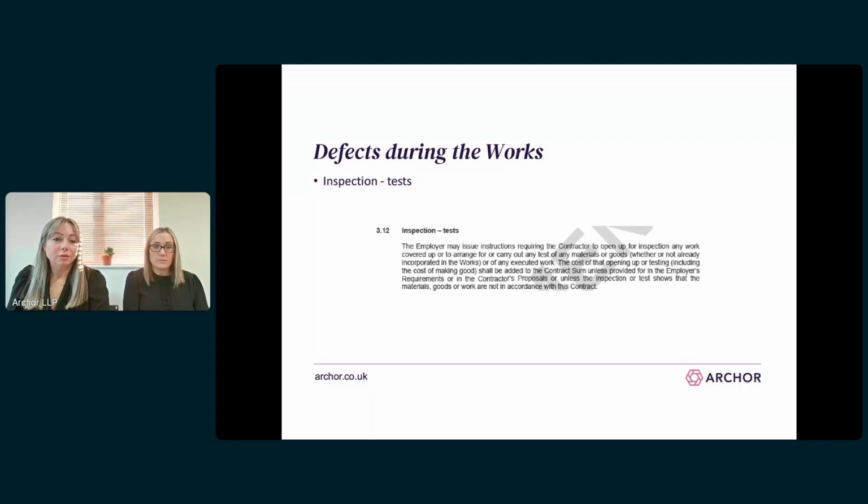So lastly is clause 3.12, which is related to 3.13, and this goes back to the opening up for an inspection or to carry out any tests. So the standard position is that the cost of any opening up or testing, and then the subsequent making good if necessary, is added to the contract sum unless otherwise stated in the ERs or CPs, unless the inspection or test shows that the materials, goods or work are not in accordance with the contract.